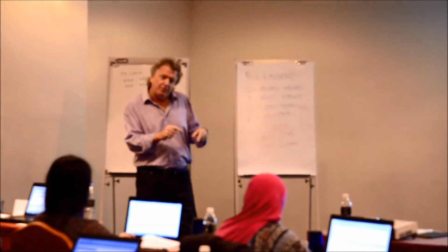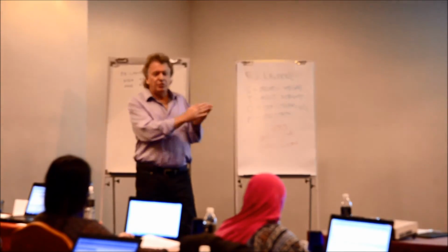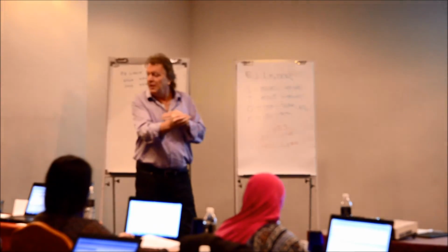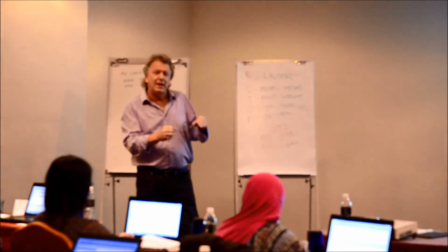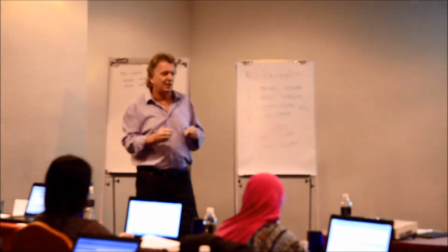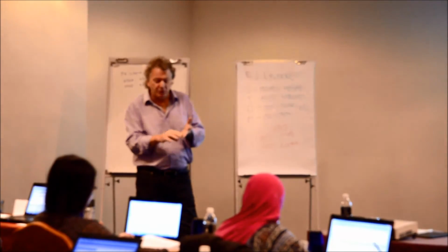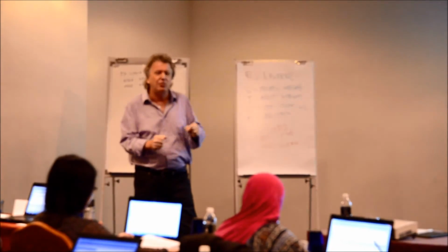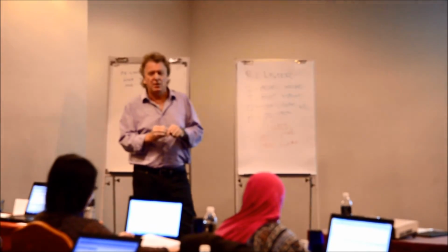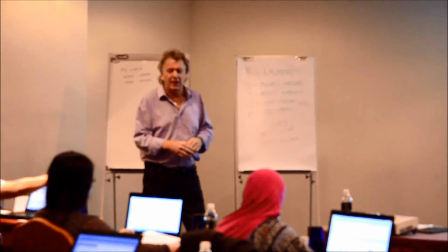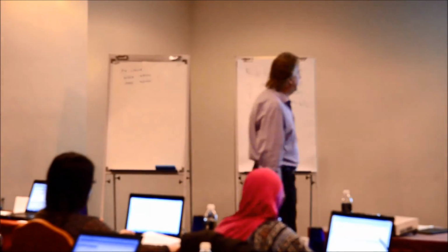I've programmed it to correct what changed and make a new plan for the next 12 hours, because we need to get the earned value every day. That's the most important thing for us: safety, quality, and earned value. We need to earn. So we do that with the computer, putting together that project plan.